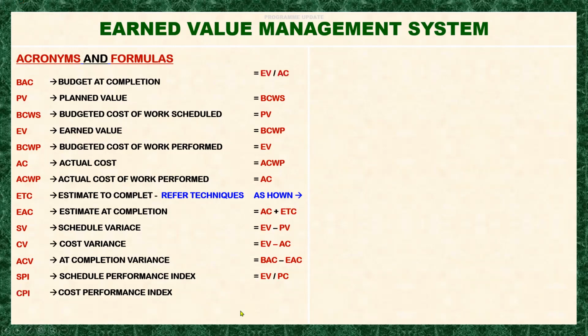We're taking time for explaining here. So CPI, the same. CPI is about the cost performance index. So this is the ratio of your performance compared to your expenditure. Okay. And we have here the performance factor. This will be used in the calculation of the estimate to complete. Okay, let's go here.